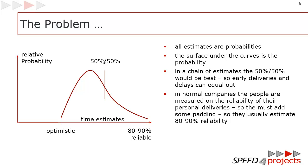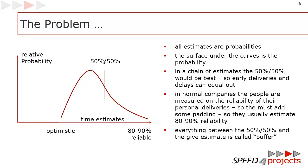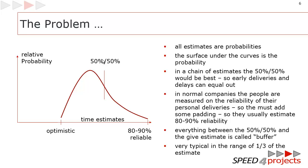We typically do a little trick. We know that 50/50 would be fine, and that means we assume that typically one-third of the estimate is buffer. No one knows and it will never be possible to measure, but it's a good first guess. In practice, the companies will learn within a few weeks whether this is right, and the estimates adjust themselves so it fits.